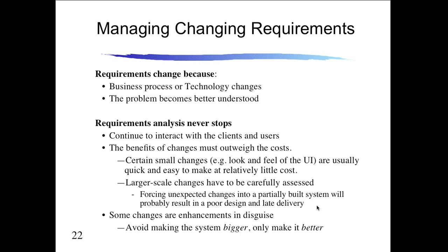Learning outcomes from the analysis and the design should go back up, and you should modify the requirements at that point. If they're major modifications, you have to decide who's going to eat the expense, because the requirements is generally your contract with the customer. This is what we're going to build, and this is what it's going to cost.